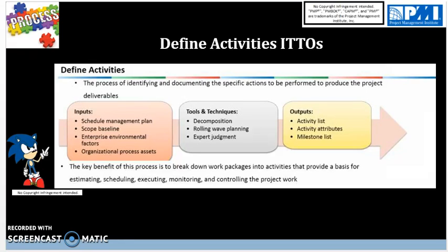The next input is OPAs, or Organizational Process Assets. These are formal or informal internal policies, procedures, lessons learned from previous projects, standardized processes, and activity list templates. Lessons learned is really important — it is the key word for distinguishing between EEF and OPA on the PMP exam. Simply put, EEFs are things outside of the project team's control, such as organizational culture, industry standards, or government regulations.